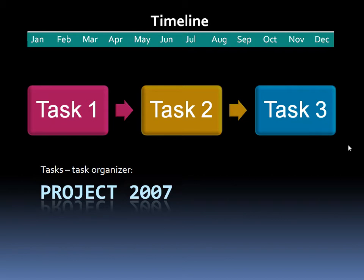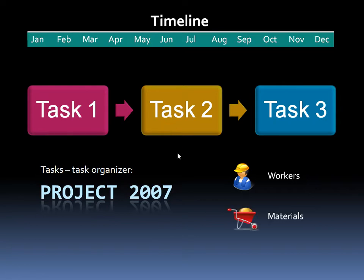Each task is going to require some resources, and there are three types of resources. You have your workers, which is who's going to work on task 1, task 2 — for example, task 2, writing the book, you could have writers. The next resource would be materials: do they need paper to write the book, or are they going to use a word processing program like Word 2007? And finally you have the cost: are you going to pay your workers hourly or salary, and of course the cost of the materials.